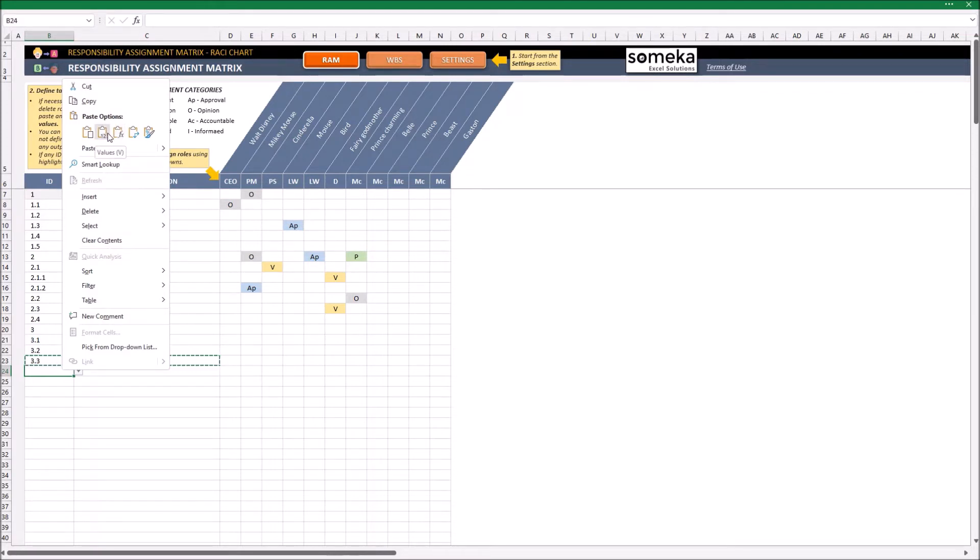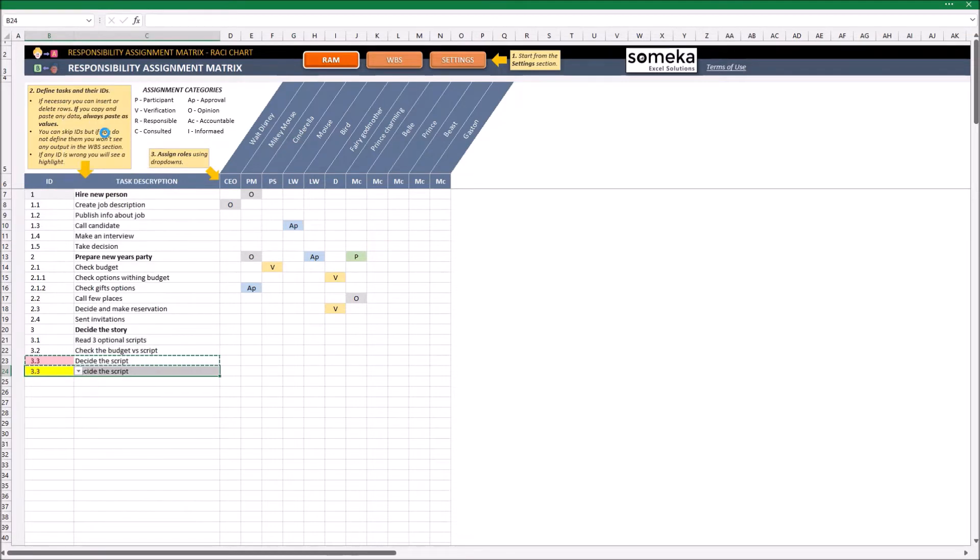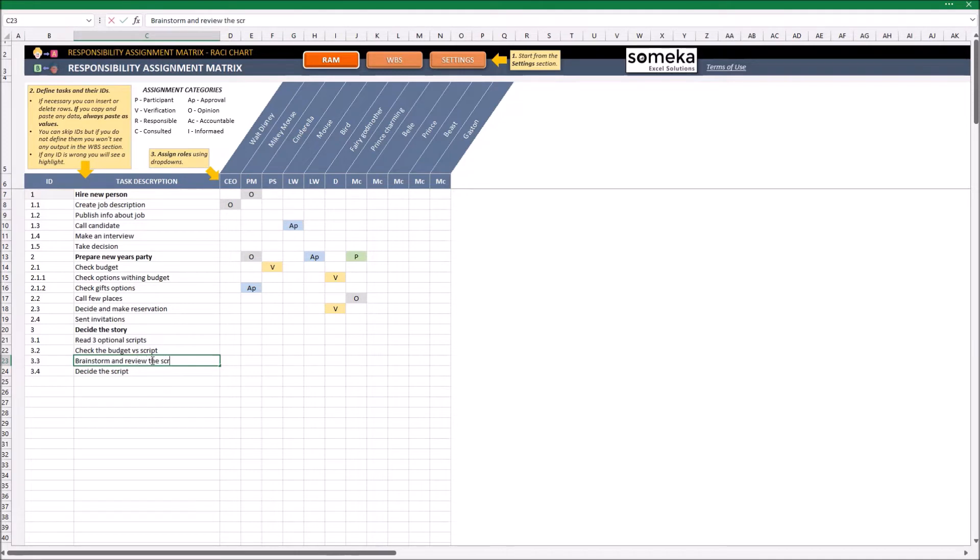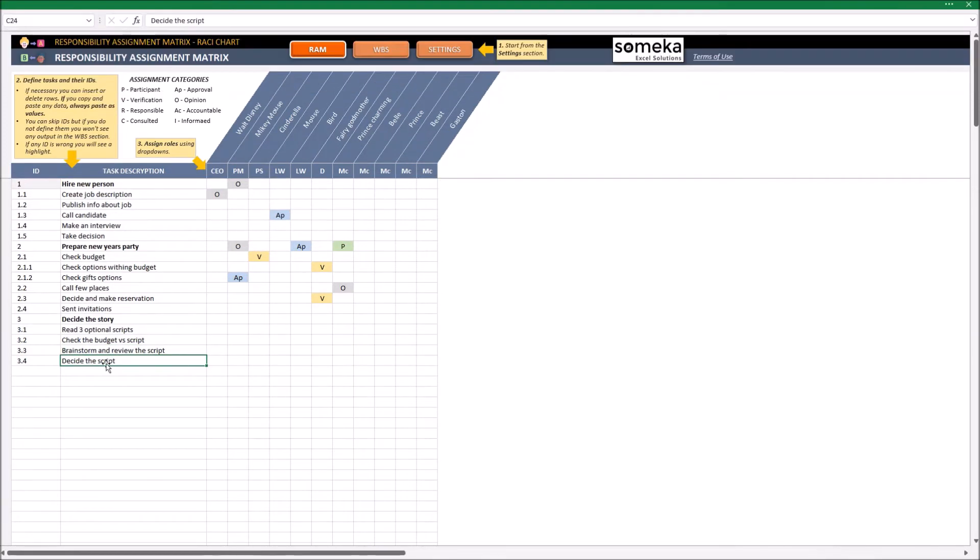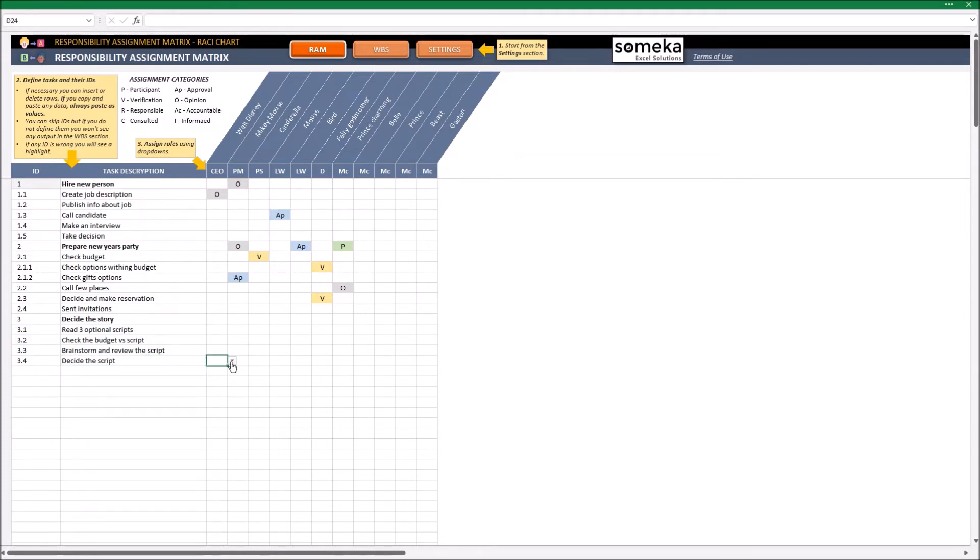It is important not to use direct copy paste or cut and paste, but just copy and paste it always as values. The ID is important to create later the work breakdown structure. Only the tasks that have ID will be visible later in the WBS section. Here, we can see some drop-downs according to the legend above. I will just assign the tasks to some people.